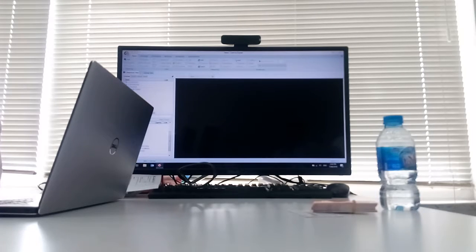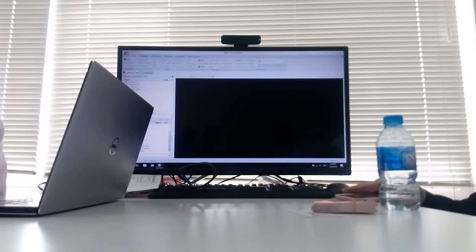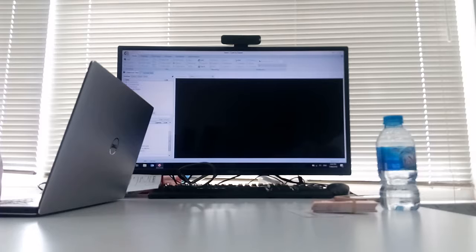Yes. For example, for a variation, we might just get a floor plan layout that shows a different door, or as you say, it might be a note that says ceiling heights changed from 2.7 to 2.85 or something like that. With that, we then have to do the manual adjustments. If we don't have the specific drawing to read from, we'd have to do it manually.